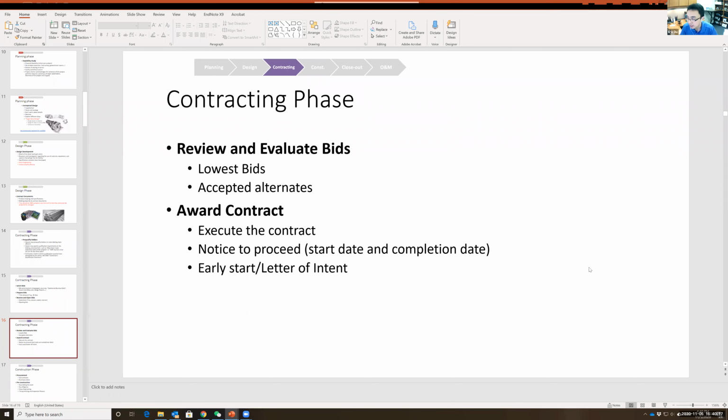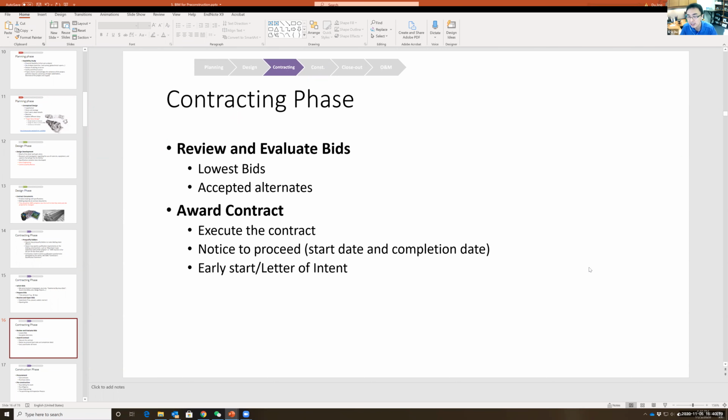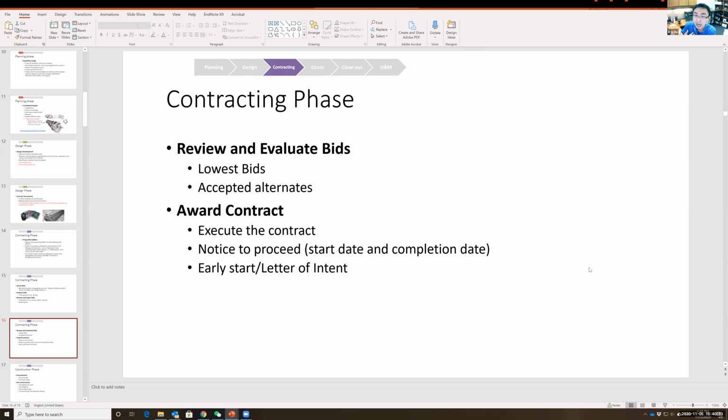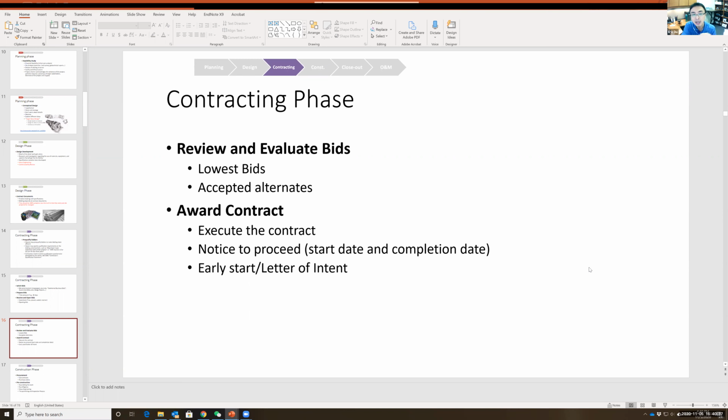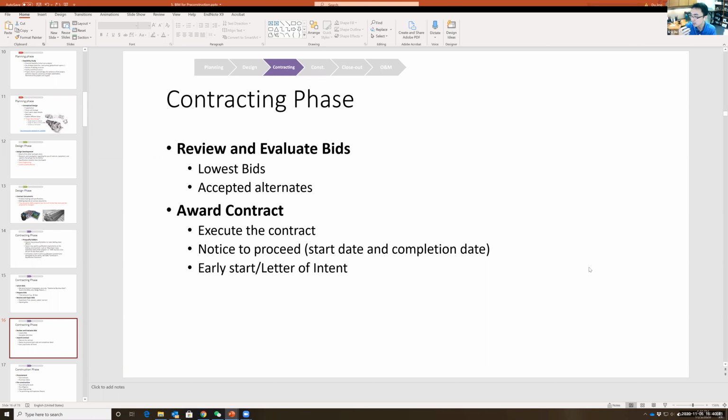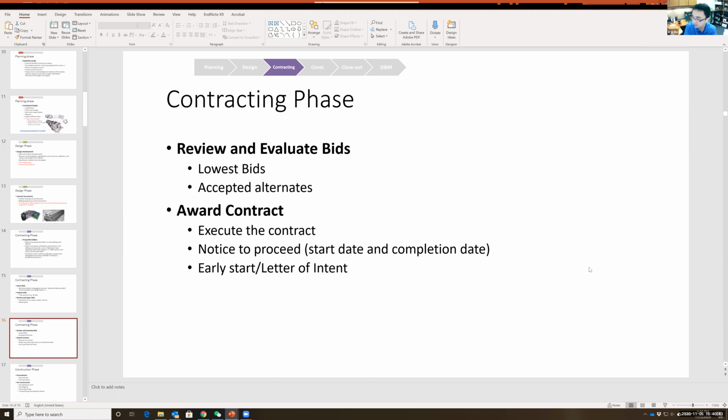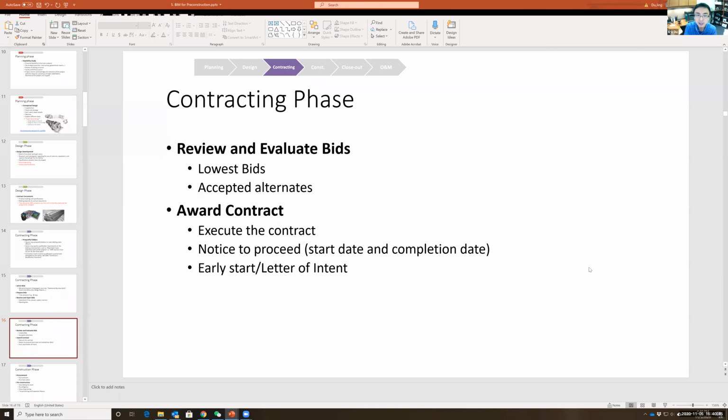This is my recommendation, and if you select this design, it would save you this many dollars. This option A is my bid based on the design you sent to us, and this number B is the estimate based on the design I proposed. And if the owner says, oh, that's a great idea, I approve that, that is called an accepted alternate, which means the owner also likes the general contractor's idea submitted to them.